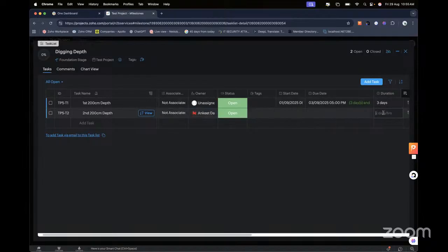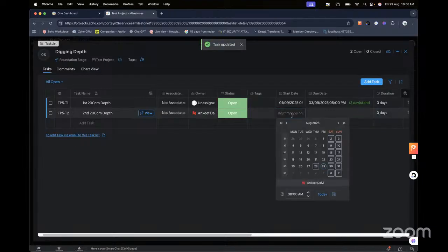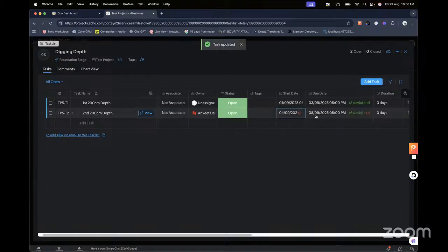This is supposed to be 3 days also. So here, you just pick the fourth day, right? Now it automatically selects when it's supposed to be completed because you indicated 3 days. Now this is Thursday, so it's selecting Thursday, Friday, and Monday. So basically, that's it.